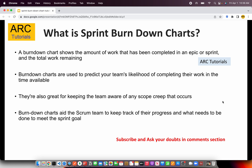So what is a sprint burndown chart? A burndown chart shows the amount of work that has been completed in an epic or sprint and the total work remaining. It's a chart where you have an x-axis and a y-axis, and you plot the number of points completed against the days. Burndown charts are used to predict your team's likelihood of completing their work in the time available. They're also great for keeping the team aware of any scope creep that occurs during the sprint. Burndown charts aid the scrum team to keep track of their progress and what needs to be done to meet the sprint goal.